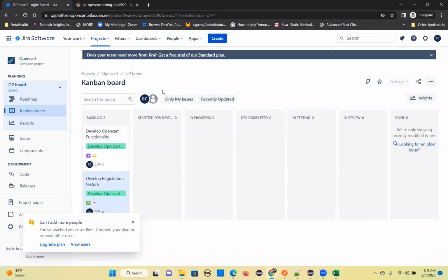So we'll see while assigning the task. Now, how to create the backlog? Can you see here, backlog? This is the Kanban dashboard. It's about our project and everything. So how to create a backlog? Backlog creation is done by the product owner. It is the product owner's responsibility, so he will create a product backlog. The create option is there.